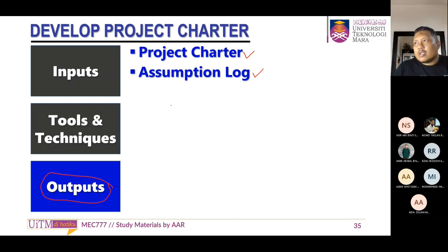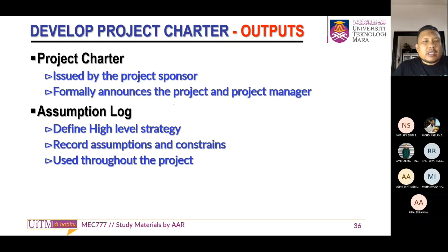For sure, we have a project charter. The project charter is issued by the project sponsor. This is the output that we got. Whatever you do in the project charter, you must declare to the sponsor, because sponsors will give you money and permission. In the project charter, the stakeholders formally announce the project and the project manager.